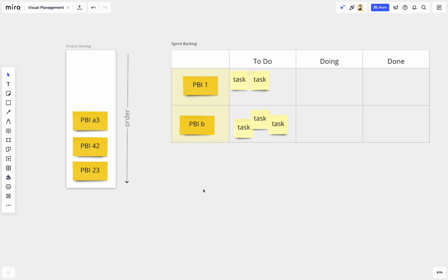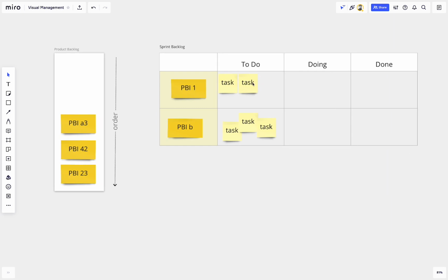So all of these simple concepts are translated in a bunch of tools all over the place. And then what happens during the sprint? The team is picking up the tasks, just putting it on done. I'm working on this, and then okay, that's done. I'm picking up the next one, and this goes on. Why is this useful? Because you don't need to create a status report. Just the team having their conversations, their daily alignments, create the status report, right? And you don't need any extra graphs or anything.